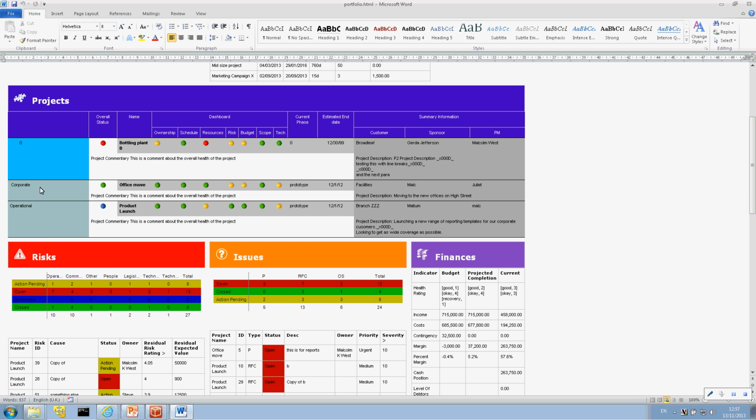Now these ones here are also coming from spreadsheets, but this is using the other method, which is called append, where we've got this block of data coming from one project. We've got exactly the same block of data with the same header, but with different content rows coming from the next project, and then another one from another project.